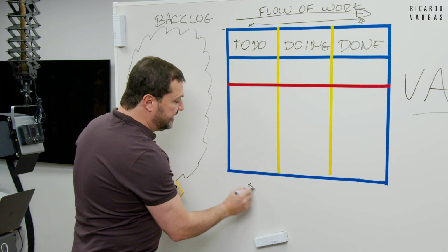But what you know is that, for example, from here to here is one Kanban board. From this, including this, is another. I do this to combine different teams, to combine the work of different teams. Another thing that we do a lot and we use a lot is different colors. And the colors work in a very similar way. For example, you can put teams and we can put types of services. For example, infrastructure, IT, or in construction, we can talk about carpentry, painting.